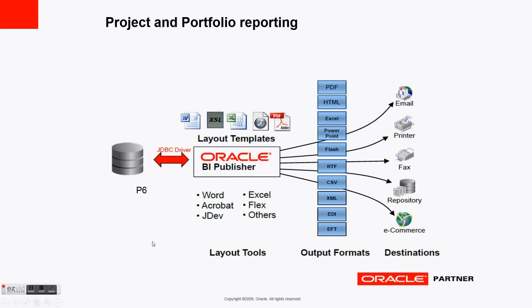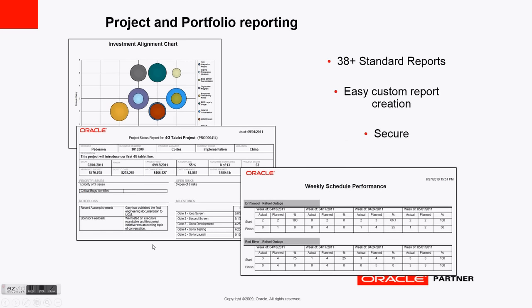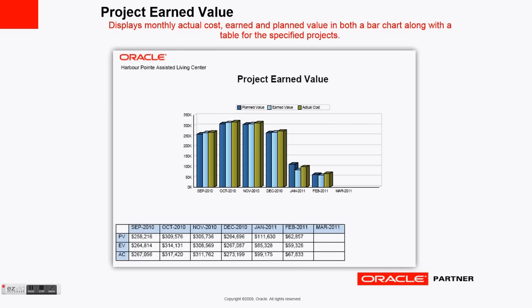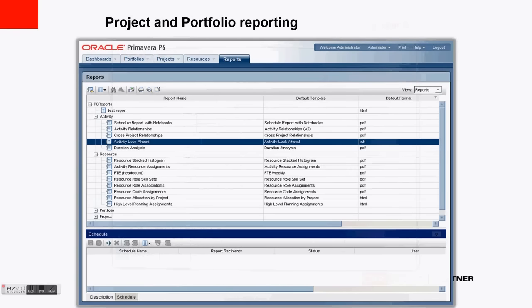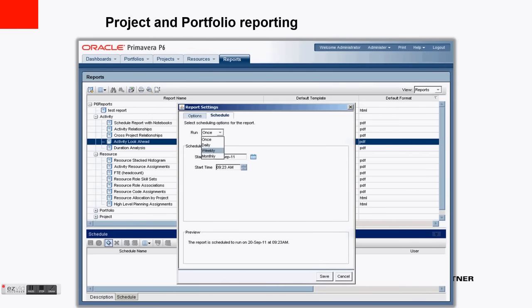Oracle Primavera P6 comes with Oracle's Business Intelligence Publisher, including 38 standard out-of-the-box reports. It allows reporting at the portfolio level, project level, and down to the detailed level, including earned value reporting. You can also automate reports by scheduling them to run weekly and email your distribution list.